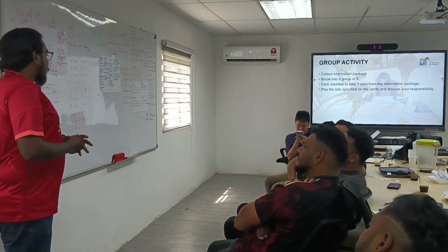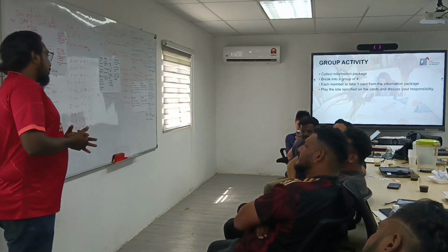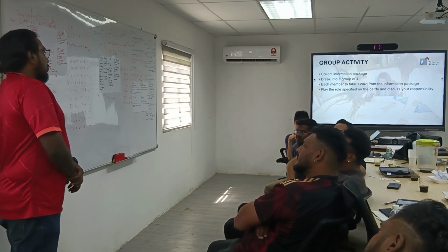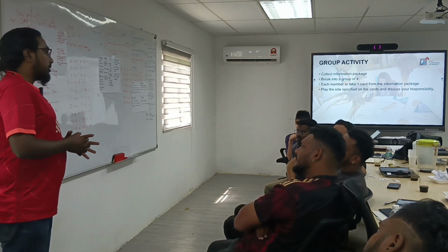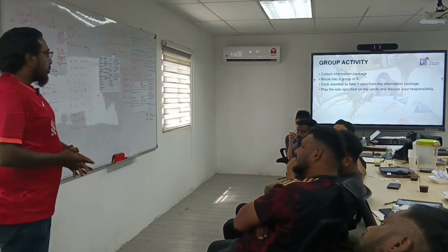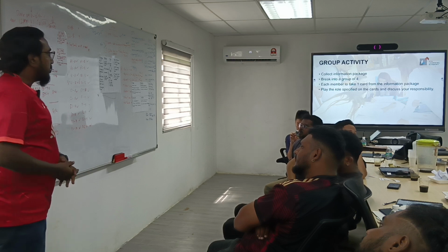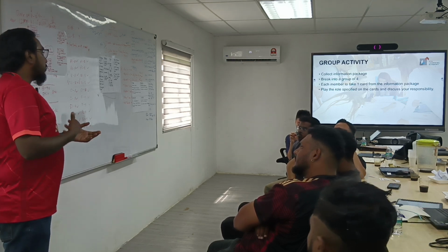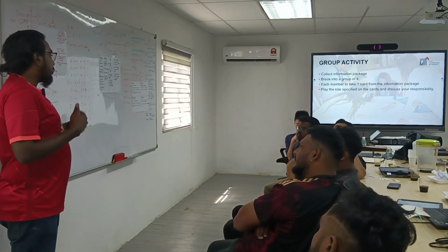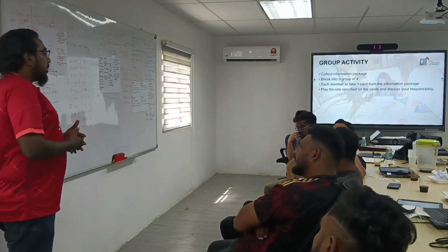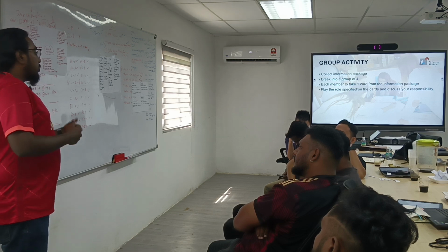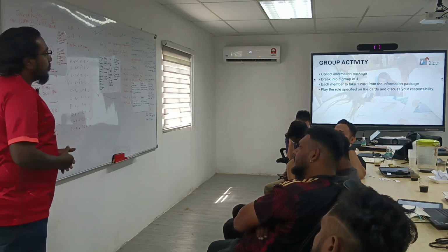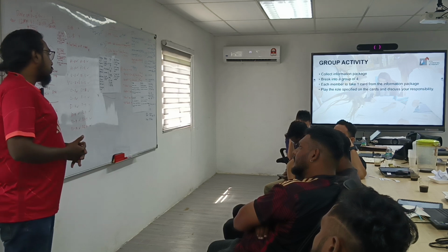So for phase 1, once we have handed over to our client, what we are encountering right now is the defects. So these defects are actually highlighted from the operation team to our higher management team. But sometimes if it is not solved within the time required, it will go up to our project managers, director to step in, to deal with the clients, because sometimes we might face some issues of, for example, the defect as in like replacing the valves or materials. It will be a delay in time, right? So we need to inform the client. So this is when the project manager will come in and deal with the clients and so on.